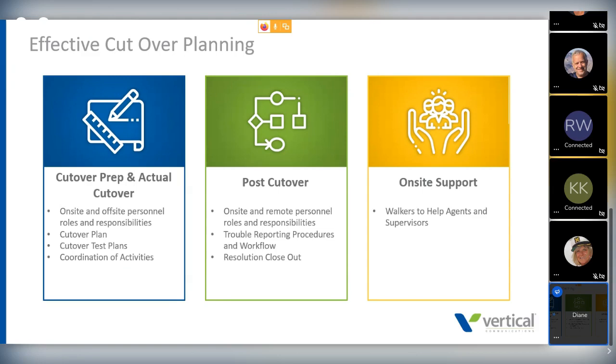Cutover prep and actual cutover. Who's going to be on site? Who's going to be off site? What are their roles and their responsibilities? What's the plan, including what's the backup plan if we have to stop and decide that we cannot go forward